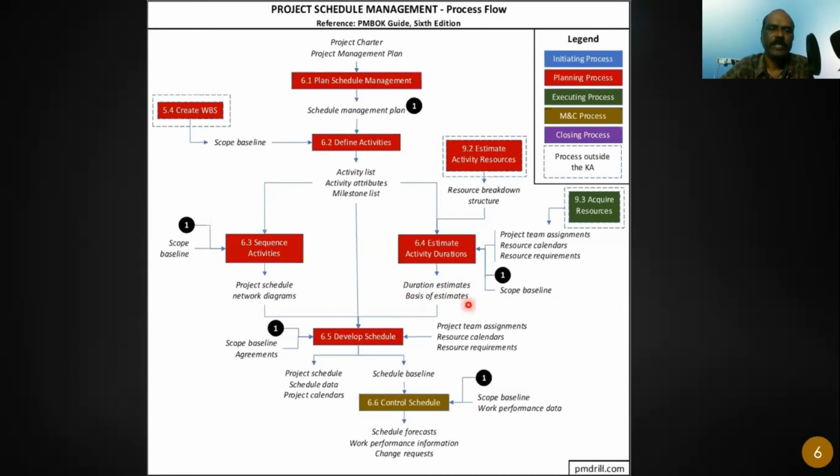And then basis of estimates. So what is basis of estimates? This is the document in which you capture how you have come up with the estimate. Like for example, if you are submitting the schedule to the customer or to your consultant, they will ask you, hey, can you explain how you arrived at this number? I want to know. Can you give me a supporting document?